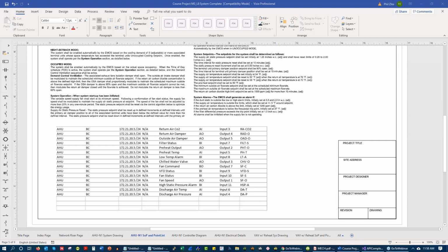What would you suggest to identify design changes based on third-party supplied equipment? The result will be the same essentially, but maybe the consultant is expecting X and we will design Y because of the supplied equipment. So that's why I recommend that you review those documents from the mechanical, from whoever's providing that packaged equipment, beforehand.